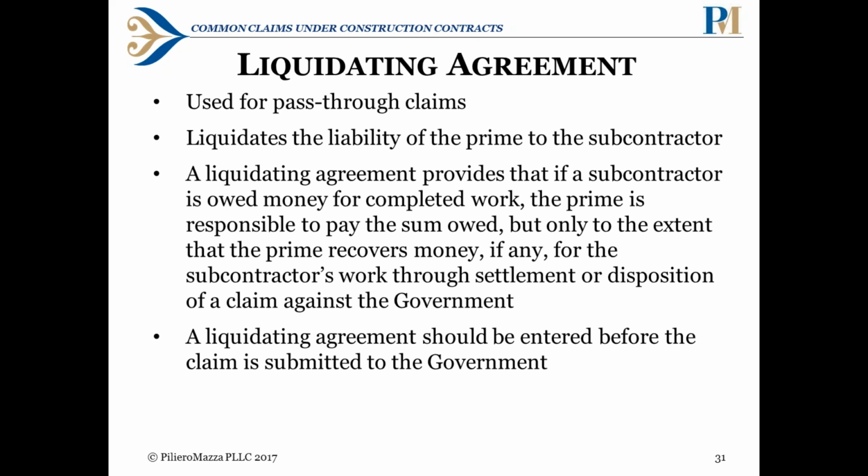It can also be done if you're submitting a claim for the prime, but there are subcontractor costs included in it. Like if there's a differing site condition that's affecting everyone on the team, and as the prime you're rolling up those costs into your claim, you may want to consider doing a liquidating agreement, because if your claim isn't successful, the subs could be suing you for breach of contract or withholding payment and whatnot, and the liquidating agreement would help protect your interests. There are some terms that need to be kept in mind, because under the Severin doctrine, a contractor cannot sue the government for costs that it's not actually going to be liable for, because then there's no point of the government paying you, because there are no actual damages. So you don't want to just draft up a liquidating agreement on the back of a napkin. You need to consult with counsel and make sure that you're addressing these kinds of considerations.